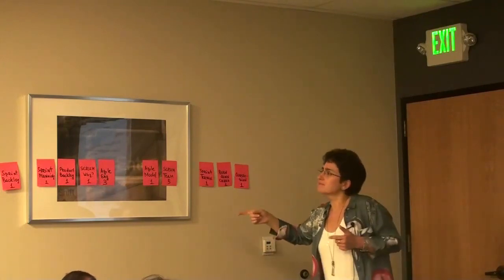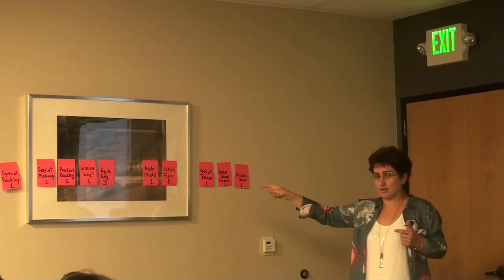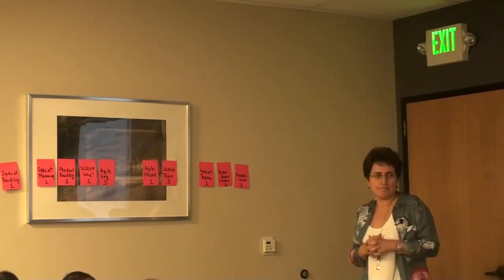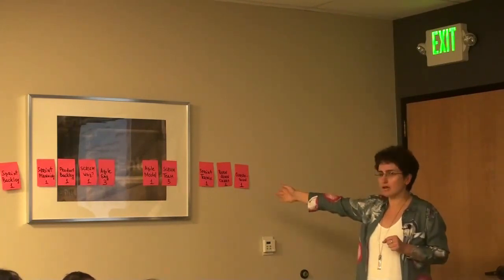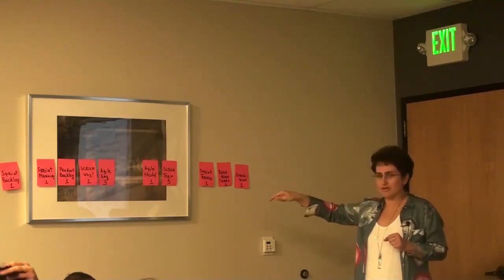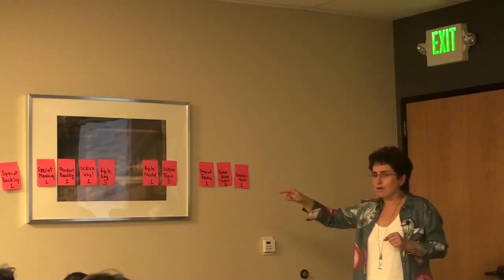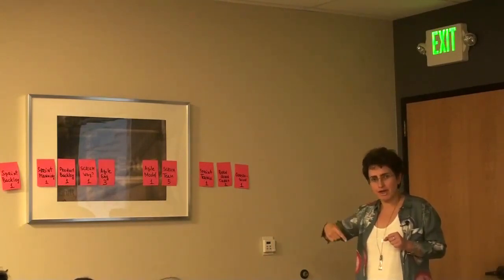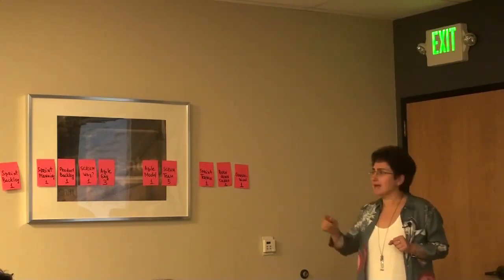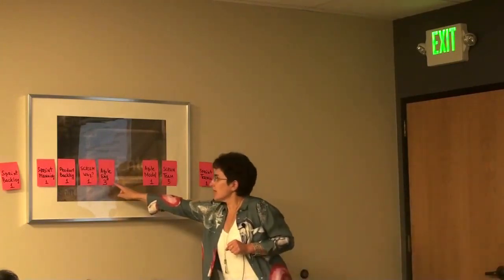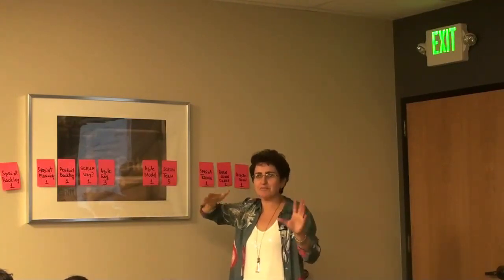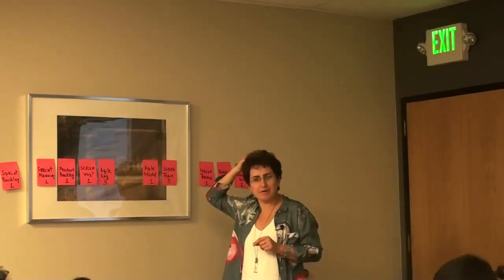In other words, if it was the actual Agile project where we would develop the software, those would be the work units. So basically, when the product backlog is defined by the product owner, the very important parameter for each feature is how much effort it will take for development to develop and for testers to test this feature. Unless you have this number, you cannot plan, and this should be in man days, right? Of course, in our case, it's relative work units. Those are not man days. Otherwise, we would be stuck for a couple of months here, right?